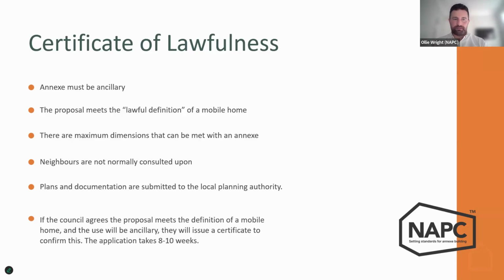Now, there's a few differences with this compared to the householder application, which is consulted on by the neighbours. You don't have this with a lawful development certificate or a certificate of lawfulness. The neighbours are usually not notified. So this can work well if relationships are fractured somewhat or there are problems there, as it's a good way to get around having the neighbours know. It also speeds it up a little bit. We're not waiting for ecology to come back or the archaeological departments at the council, which won't go slow. So yeah, that can really help.